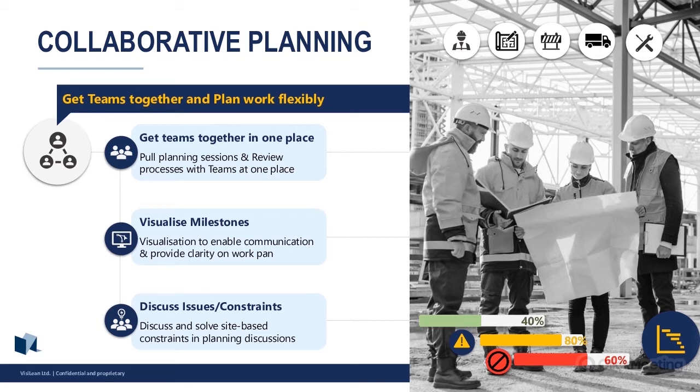To facilitate this, I would get up the milestones. So we've got, okay, we need to get the foundations done by this date. So I bring in the foundations team, I bring in probably the team that come after them, the team before them, and we know that that's the date. Then let's break that down. What are the smaller activities we need to get to meet that milestone, okay? Then once we've done that, what's next? Okay, something comes after the foundations. Is that going to be ready? What do they need? And that's how I'd facilitate that conversation.